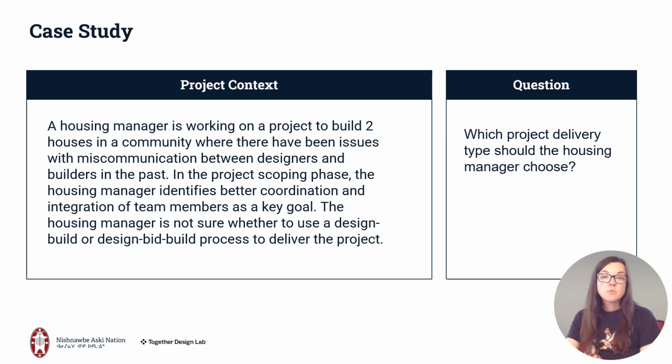There has also been a shortage of labor and a shortage of contractor availability, not just for the remote north, but nationally. You may choose the design bid build process, but you may only get 1 or 2 bids to your tender package. That shortage of contractors nationally has escalated costs as well throughout the construction process.